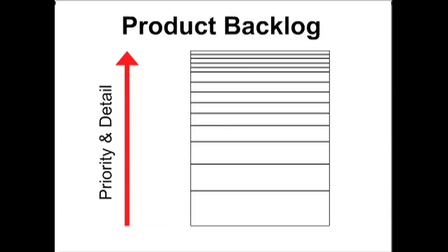And that level of detail could mean refining the user story, being more clear about it, breaking up the user story into multiple ones. We even sometimes combine them together. They're too detailed, and we pull them back up into a single user story, and then taking those user stories and decomposing them into the acceptance criteria and then the detailed tasks. So that's a very important concept for us to always try to not go in either direction, too detailed or not detailed enough, and we're guided by where it is in the priority, and is it upcoming for us to actually do within a sprint.